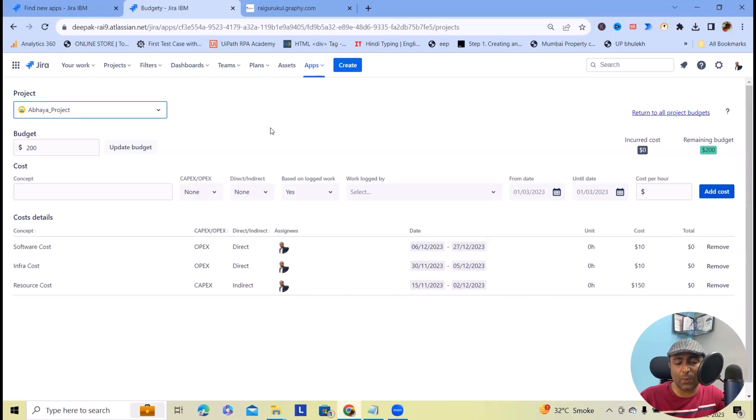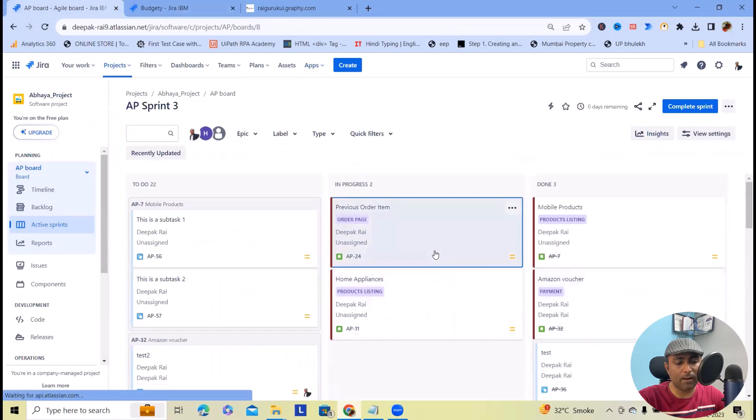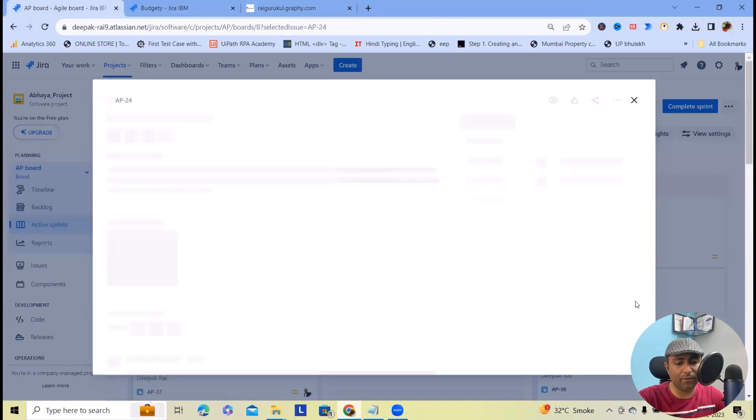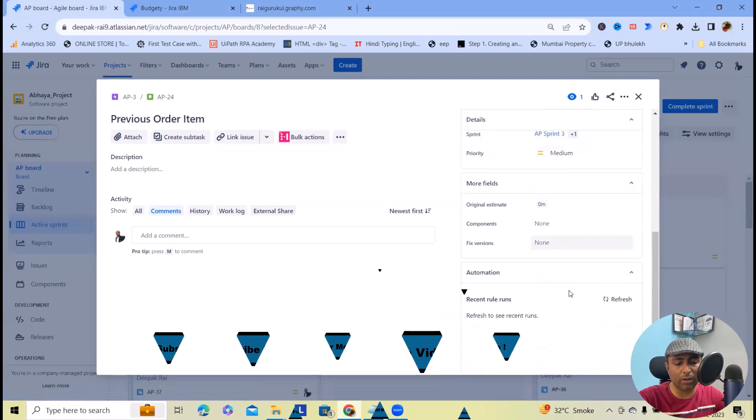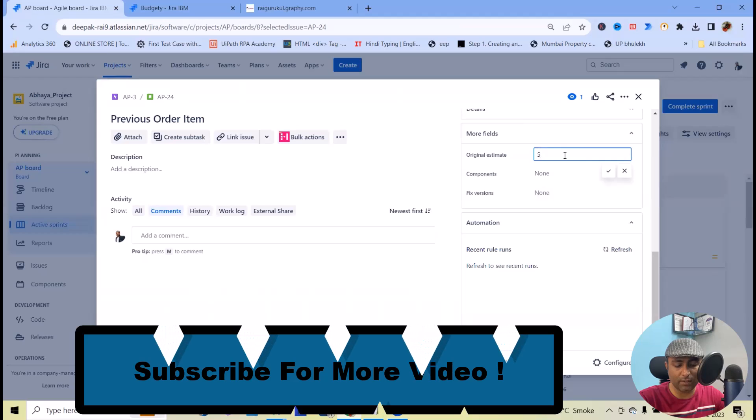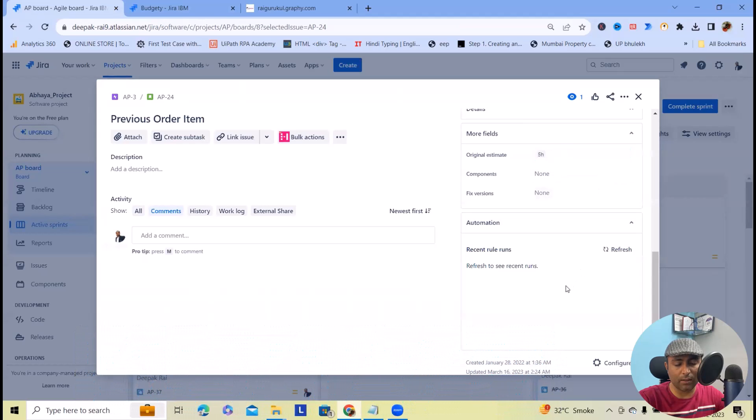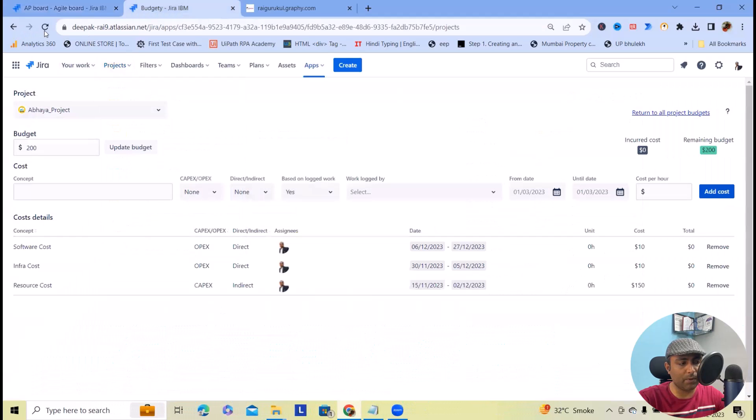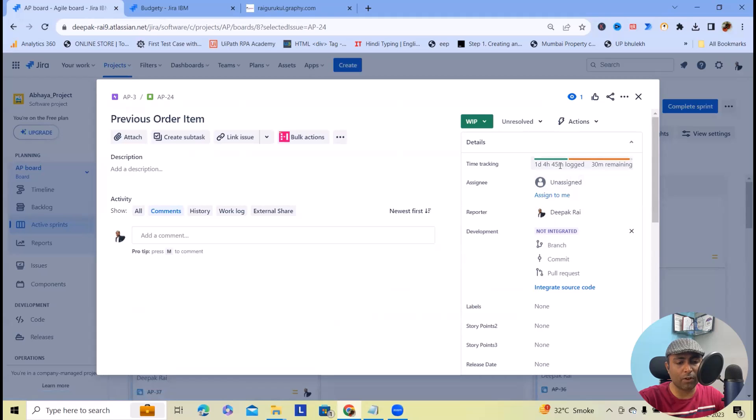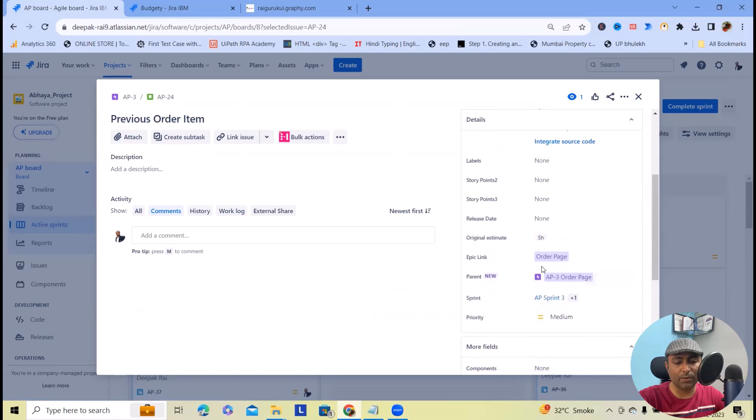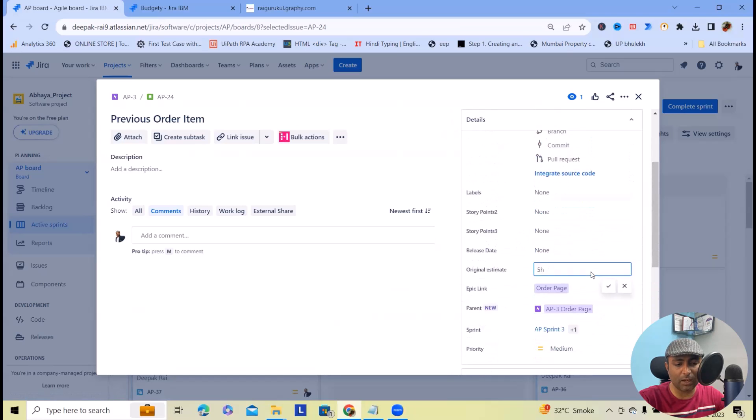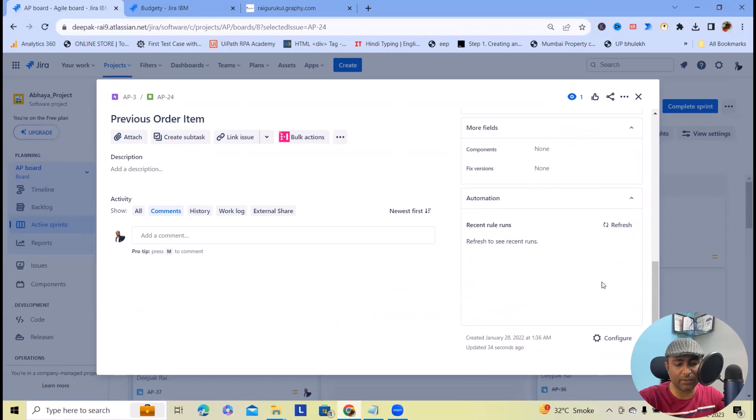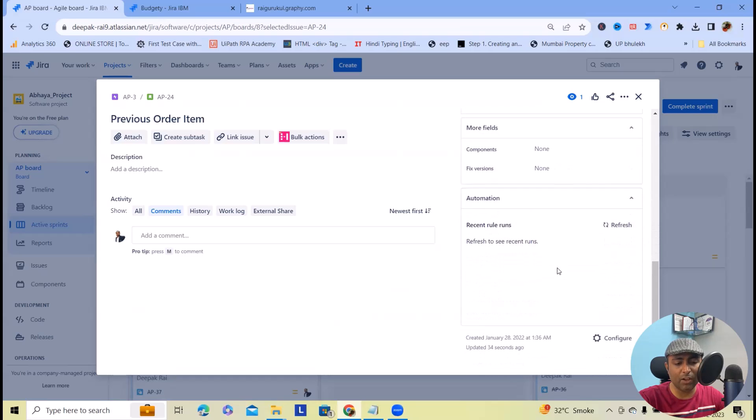Once I navigate to this project, let me fill this as original estimate—five hours. Let me refresh this. One day, four hours, 45 minutes logged, 30 minutes. These are my original estimates, and based on how much we have consumed, it will showcase our remaining hours.